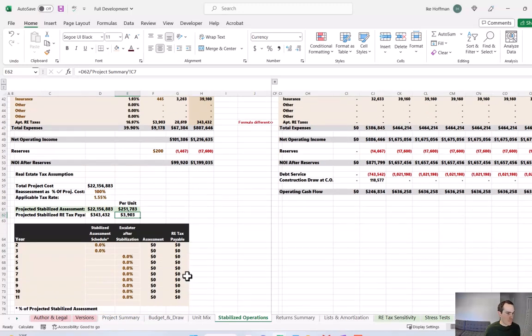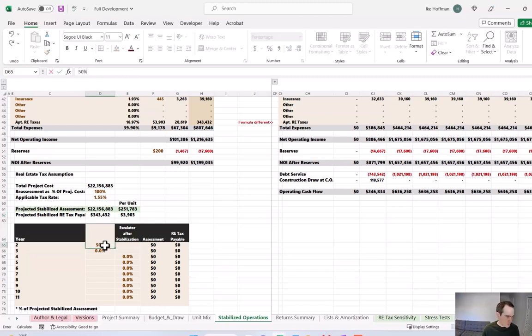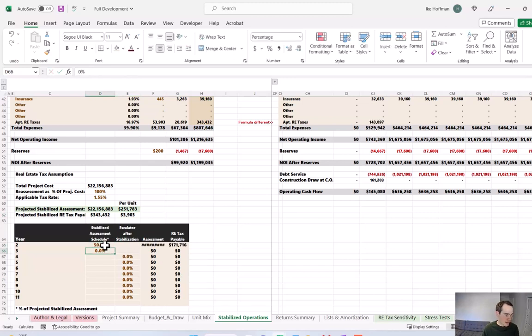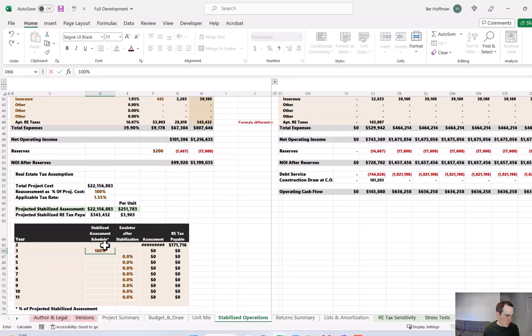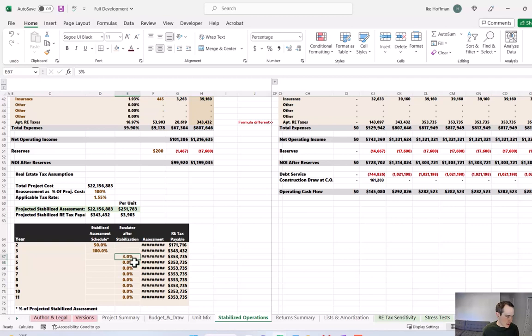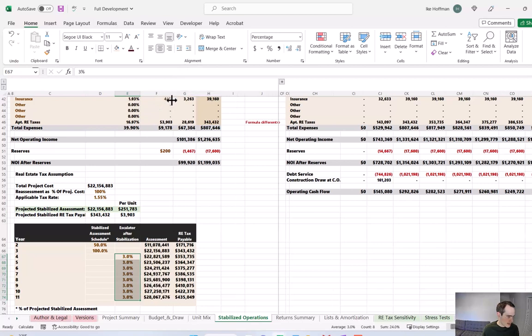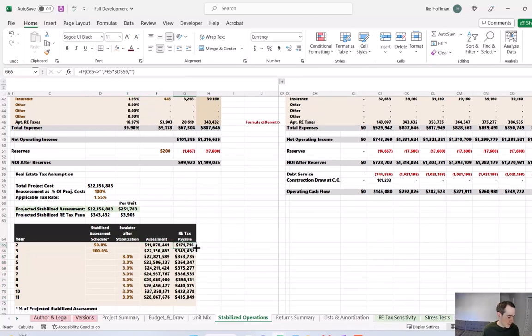But then we need to determine when these property taxes will stabilize. Remember, this property is being developed, and you may not see the full burden of these property taxes until year three or potentially even year four. So I'm going to say that in year two, that's when we would finish construction and begin leasing. The assessor is probably going to see us as being about 50% stabilized. And then in year three, we would be fully stabilized. And from there, property taxes would increase 3% a year thereafter, through the end of the pro formas. If we widen this column a bit, you can see in year two, we're going to see $171,000 in property tax liability. And then it's going to jump up to that stabilized amount in year three, and then 3% increases thereafter.